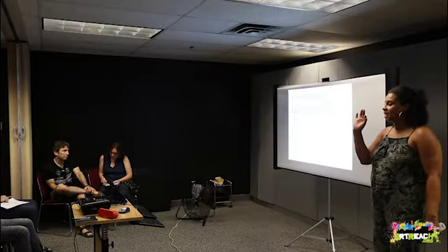Okay? Number 8 is communications. Super critical. I think it's one of the most critical sections that needs to be detailed out in a project management plan, because that is the area where, as we all know, communications can get broken telephone very quickly. That whole section is just to tell you how your team is supposed to communicate. So if you want to make a change in your project and the communications part of your plan says nobody can make changes without email, it has to be in email authorized by this person, that means if somebody made a change without doing it that way, that change is void. You can't do that change, right?